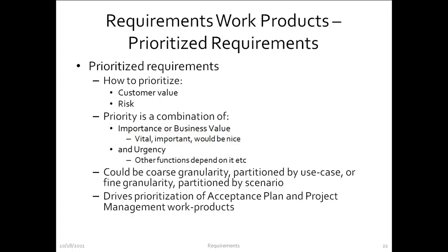So for example, a login use case or a login scenario doesn't really generate much business value because it's not a transaction that generates revenue. On the other hand, it has high urgency because other functions depend upon the login functionality being available.